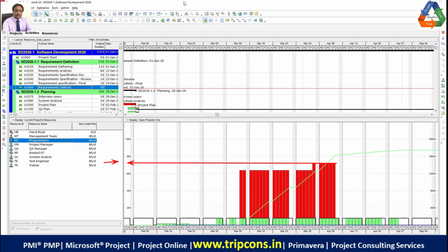Make your intelligent guess. See, resource requirement is always determined in the multiple of 8. It is a table of 8. So where do you think it is touching here? Guess. What is my 72 on a table of 8? 8 nines are 72. Then you get 8 tens are 80. It cannot be anything other than multiple of 8, right? So you tell him that I need a capacity of the 8 nines, the 72 man hours of the programmer.